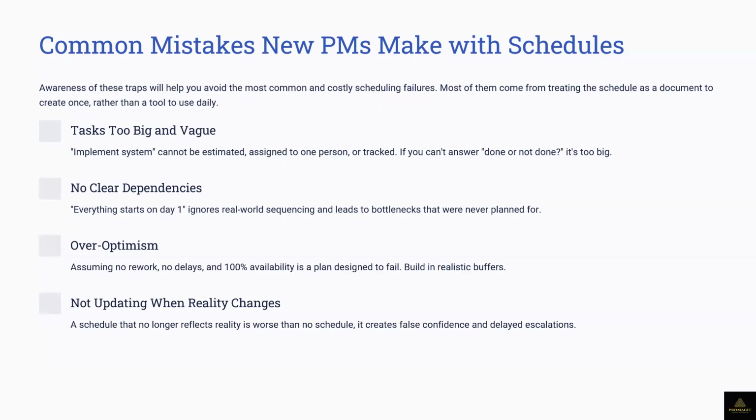And when you update it, sometimes you keep silent. Really not because you want to lie or you're hiding anything. Like I tell you, schedule is a communication tool. Even if I change the days, most of the time it might not really affect the end date of the schedule. Most of the time, I don't really speak about it, and there's no real need to speak about it because the end date is still the same.